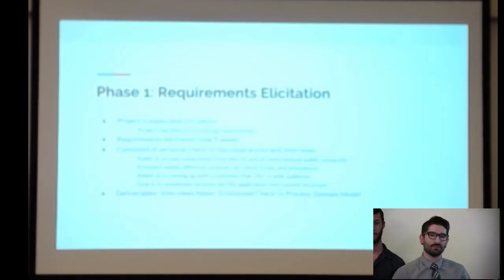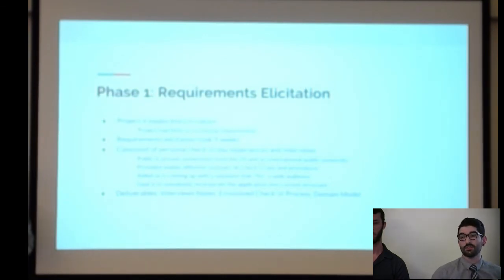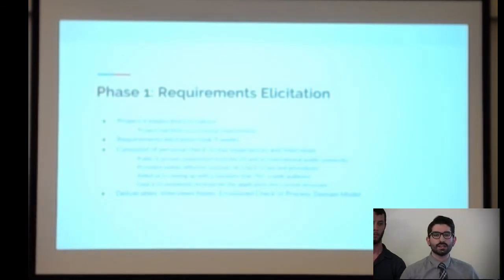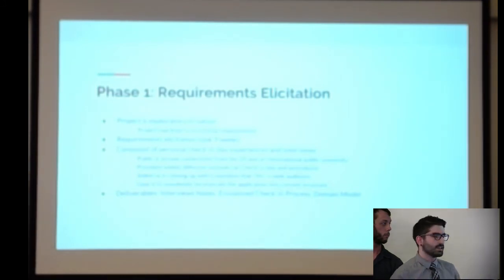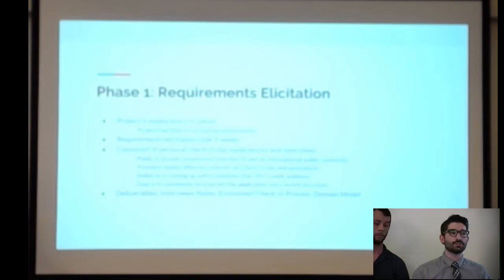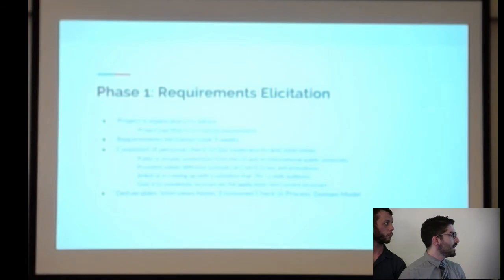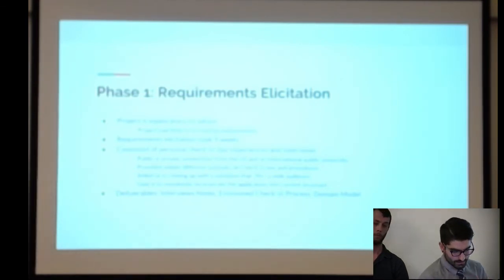So we elicited the help from some of the StarRes customers. These were universities, a various amount of public and private universities, 2 of which were in the United States, 1 of which was international, just so we can get that differing type of check-in process. And the whole goal was to validate or give us some indication about what we need to do further research into, which is great because that's exactly what we got from it. The goal of this was to seamlessly incorporate, so this really helped us get all the ifs and buts that we were forgetting about to begin with. And so the deliverables from this were the interview notes and the envisioned check-in cycle, which is what I'm about to go over.